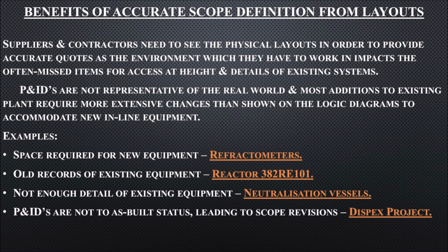P&IDs are not representative of the real world, and most additions to existing plant require more extensive changes than shown on logic diagrams to accommodate new inline equipment. Here are some examples illustrating the issues faced and how this method of work resolves matters.